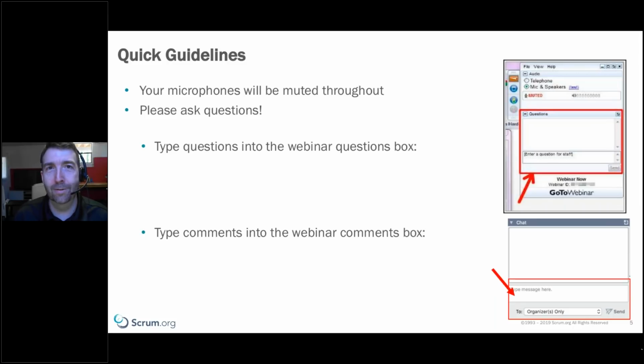Early on, Scrum teams wanted to kick analysts out of the team, because the method of delivering those requirements was different before Scrum came along. But the analysis capability, the performing of the analysis, is a super critical role. The thing that I would caution you to watch out for as a development team member or as a Scrum team member is, Scrum doesn't have a role called analyst or business analyst. And so we expect the analysis to be performed by development team members and the product owner and people assisting the product owner, but we don't want this conduit where the product owner passes requirements through an analyst, and then the analyst passes requirements to development team members.